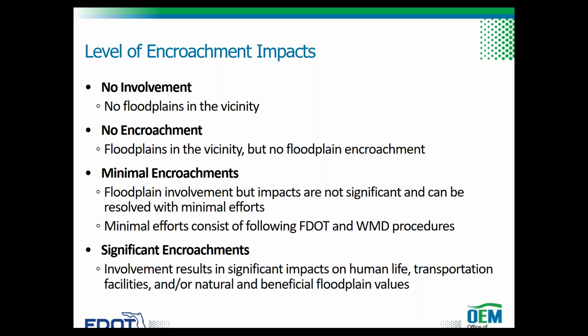An alternative is considered to have significant encroachment impacts when it involves one or more of the following construction or flood-related impacts. A significant potential for interruptions or termination of a transportation facility which is needed for emergency vehicles or provides a community's only evacuation route.